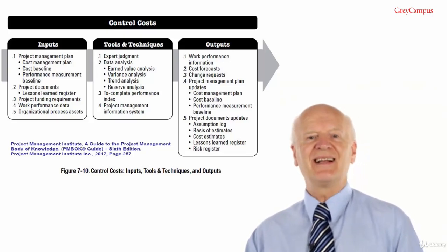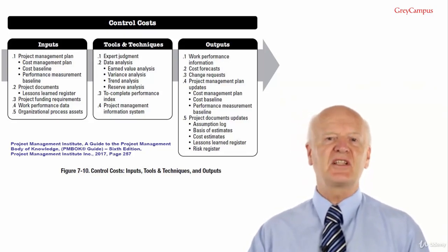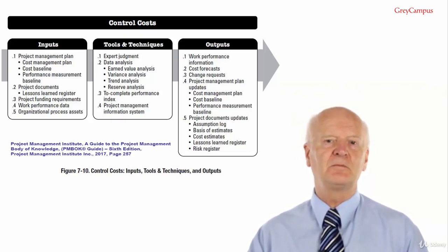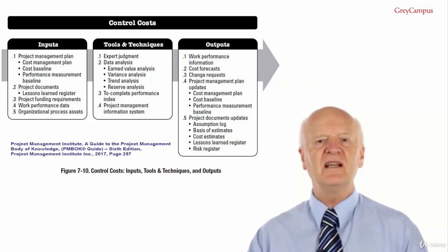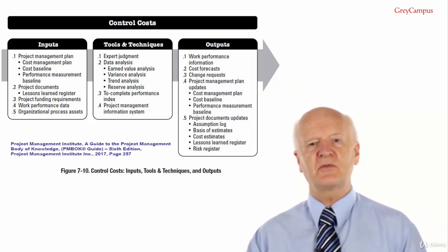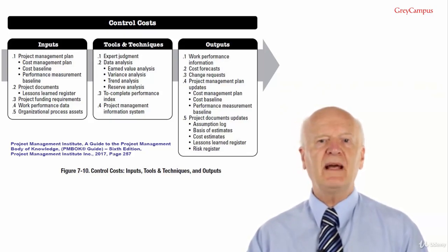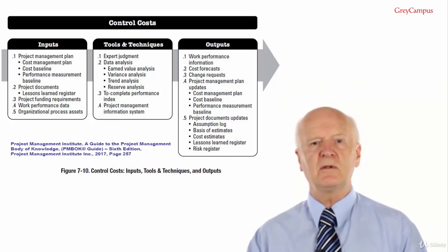Actual cost, AC, is the realised cost for the work performed on an activity during a specific time period. Okay, what's that in English? It means how much in terms of actual dollars have you spent to create that earned value. Let's look at our brick wall again. We budgeted $1,000 per day and expected to build 10 meters per day. So for 3 days, your planned value is $3,000 and you should have built 30 meters of wall.